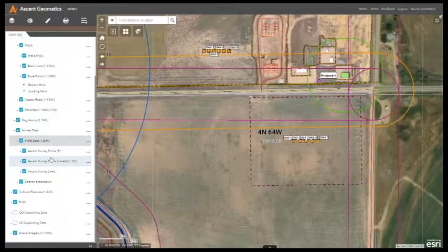So maybe, like you said, there's a pipeline scar that's there, maybe there is a water feature that's there, maybe here in Colorado, there's a new housing development going in. Or maybe the geologist says we need to move this. So there could be a million different reasons, but essentially then we go back out, that's that revisit that we talked about, and we continue to survey it, bring it back, operator reviews it again, we go back out, resurvey it in a new area, and that back and forth happens, and every time that happens, there's a short delay in ultimately getting to a place where they know it's going to go and ultimately getting their permits.